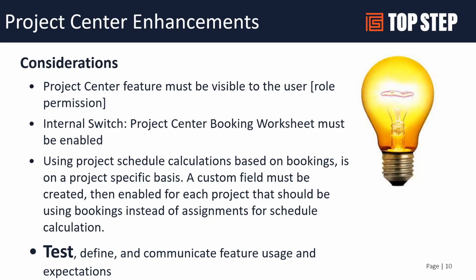It's on a project by project basis. So it's not something that you just turn on in the system and then your schedule is driven by bookings. There's a custom field that would need to be created on that project properties page, and it'll need to be enabled on a project by project basis. So it's certainly something to keep in mind, and it's nice if you want to try and pilot this with 1 or 2 projects.